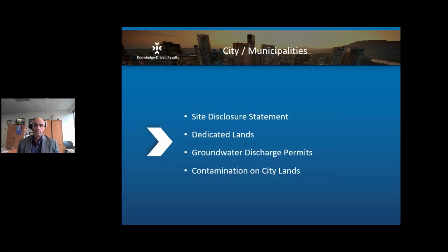Are there any dedicated lands? Often the cities will take a narrow strip of dedicated lands along the front of the road. This is required for road expansions, or for whatever reasons the city may need this for future use. During planning stages, we often recommend during your drilling investigation, install an investigation location on that narrow strip of land. The incremental cost of doing this work and applying for that separate certificate is minor at that stage. If this is missed, you need to go back and get this instrument for that dedicated land. Your cost could be substantial.